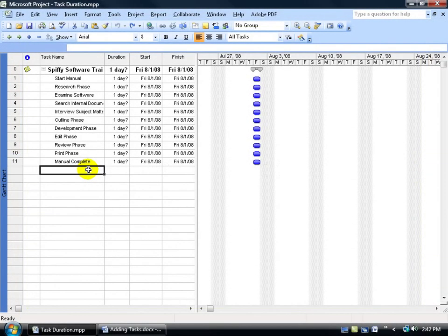As we've already seen, when it comes to creating a new task, by default, Microsoft is going to give the task the duration of 1 day. Why the question mark? Well, it's an indicator to let you know that you didn't enter in the duration, but Microsoft did, so you're not confused. The moment you come in and decide to change the day, it'll actually get rid of the question mark. Now keep in mind, you're going to be dealing with tasks that require maybe just minutes, hours, weeks, or months, not just days.